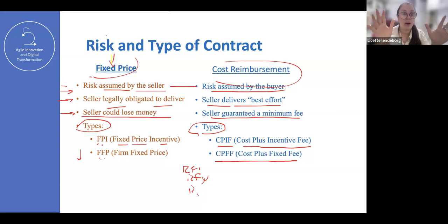It's just 23 hours at $100 the hour, just to put a number. So that is a fixed price based on the contract. They don't care if I spend more than 23 hours getting ready for the class. They are not going to pay any extra cost. Is that clear? It's a fixed price, period.